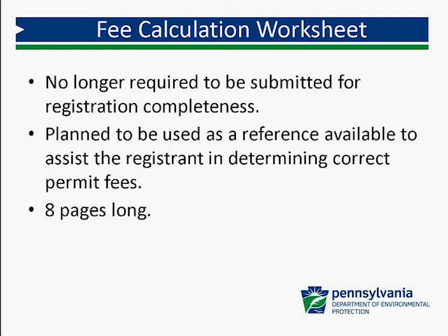But if you have a project that is impacting potential wetlands within the 15-county bog turtle area, it's my understanding that it will generate a response for PNDI and whether or not you're going to impact wetlands or not, and you may get a clearance or you may get a hit.